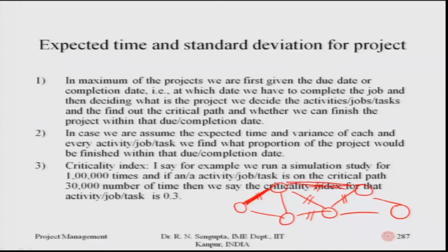When added up, you will see they are some logical activities, but they do not complete the project. That means they are not as per the concept of the critical set of activities which makes the critical path, because you have to start at 1 and finish at 6. If 4 6 or 5 6 is not there, it does not make sense to consider them as important for the critical index concept.